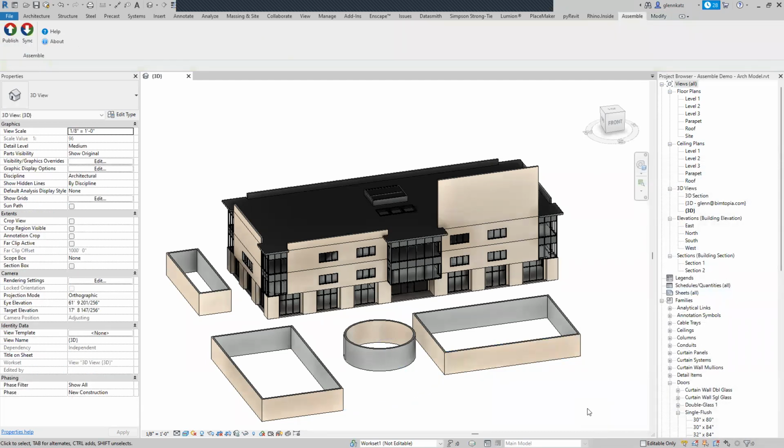Okay, that's all looking good. We are ready to update our estimate based on this. So this is strange. I thought it worked with sync, but it doesn't. I know I've told some of you sync is the way to do this, but sync is really about pulling the information back from Assemble. What we want to do is publish again.